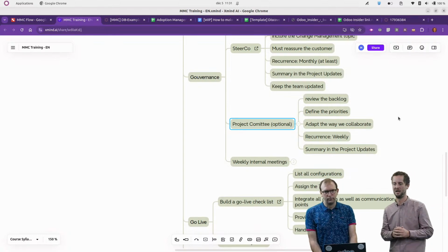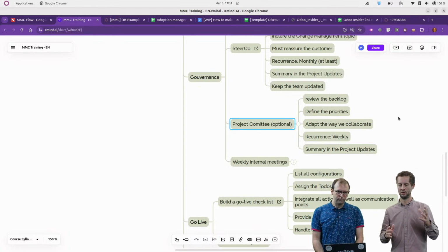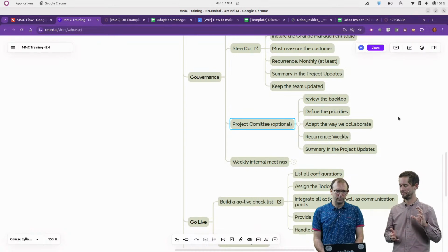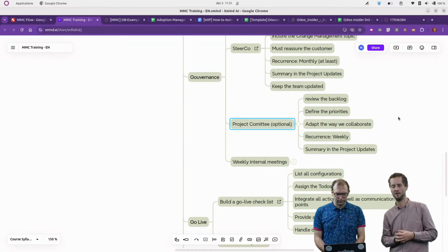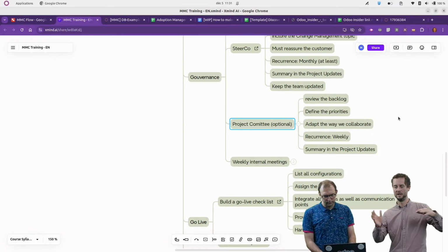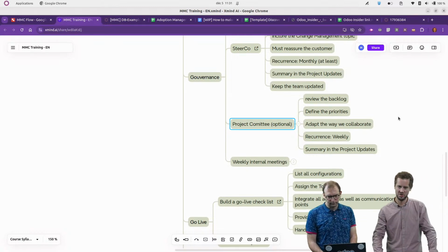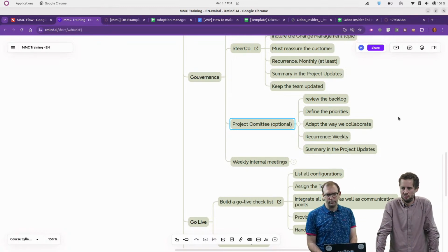Most of the time, the integration that we have to do is on the accounting level, because in some projects we tend to push the finance part to the end, because we know that the accountants are quite adverse or change reluctant, because it's important to find the right number, etc. So it depends really on the case, but basically most of the time we still have to integrate with at least one external platform, because we also depend on their past projects.